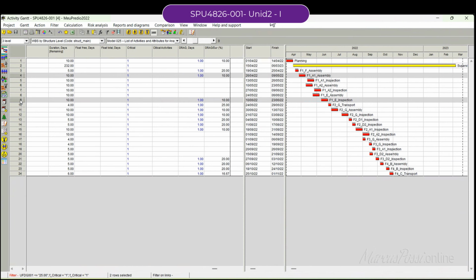How much will I spend reducing 1 day in this activity, this activity, this activity? Then you decide the less money I spend to reduce the more numbers of days in the activity duration. And this layout is just a layout nobody will see, just you. Yeah, actually, it's very good.